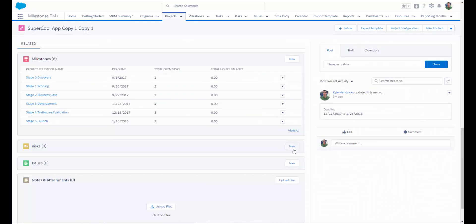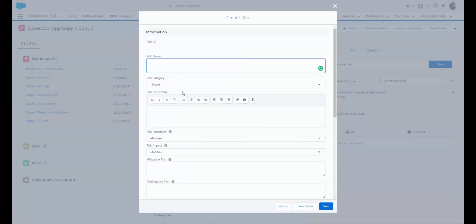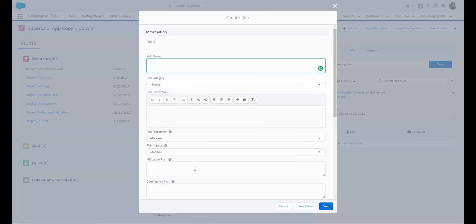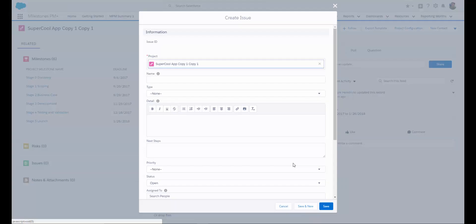Milestones PM Plus also gives you the ability to track any risks or issues associated to the project. If we want to create a new risk, just click New, give your risk a name, select a category, enter a description, and enter any mitigation or contingency plans that you need to have in place. If any issues do arise during your project, you can simply click New and enter all of the details about the issue that was encountered.